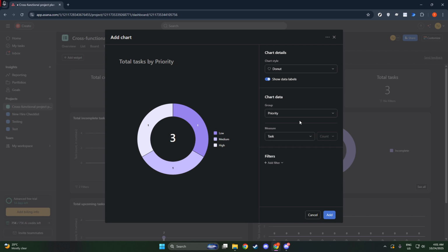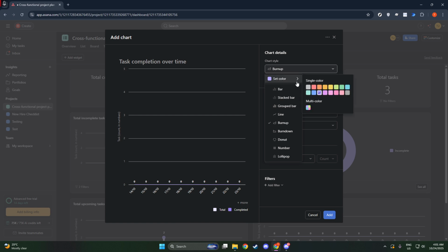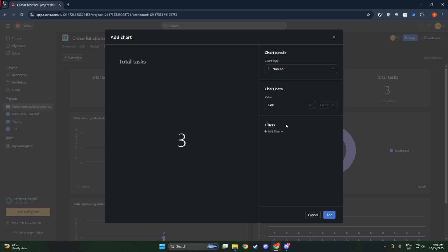doing what. A burn-up chart, on the other hand, is effective for tracking team productivity over time, showing you the total amount of work completed against the scope and time. Lastly, if your focus is on numerical data, such as budgets or hours worked, the numeric roll-up widget will provide you a summarized overview in just a glance.